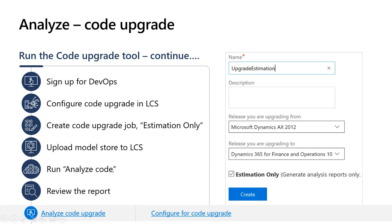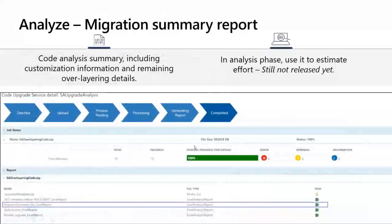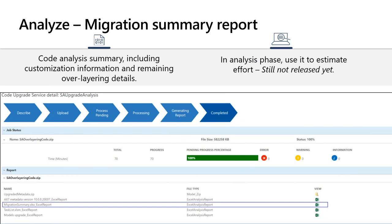This is how LCS shows the completion of the code upgrade process — you can see the process has completed, how long it took, and a list of reports. The main important report is the Migration Summary, which shows a list of overlayers you have done along with the conflicts that need to be resolved, giving you a signal for sizing. We are working on adding more meaningful feedback to the migration summary — currently it counts how many overlayers were done on each object. We want to add bucketing to help with estimating effort, and I'll discuss that in a few slides.